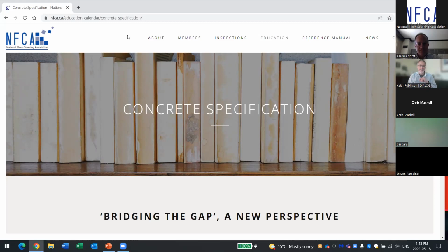And it's the dry concrete finishing trade that we discovered through our deep dive with this committee. And Keith, I think it was you talking to the Concrete Association that uncovered this aha moment that dry concrete finishing is a trade that actually gears itself, targets itself to pour SLU and to grind high spots. The biggest aha moment we had.